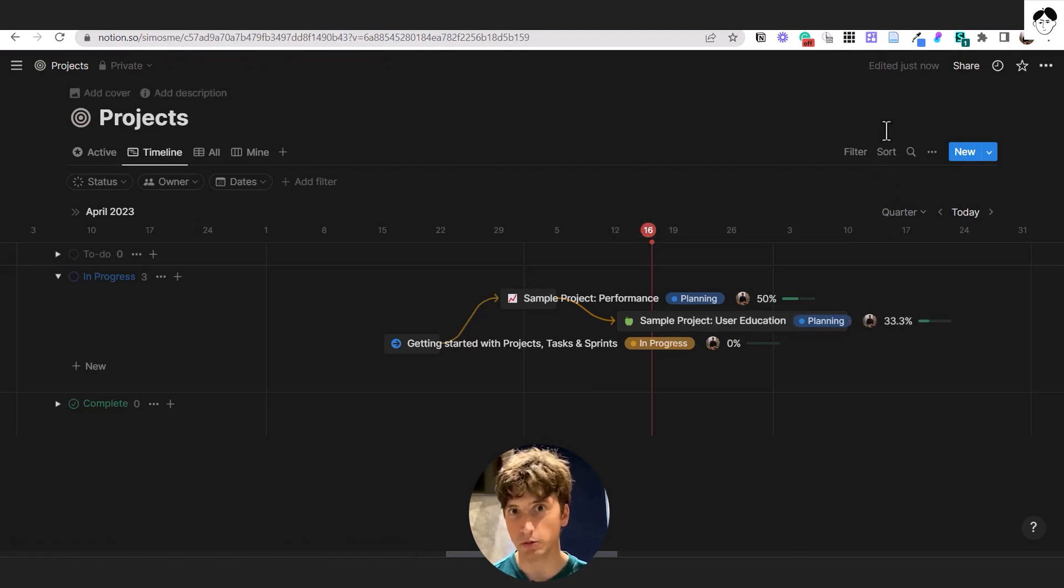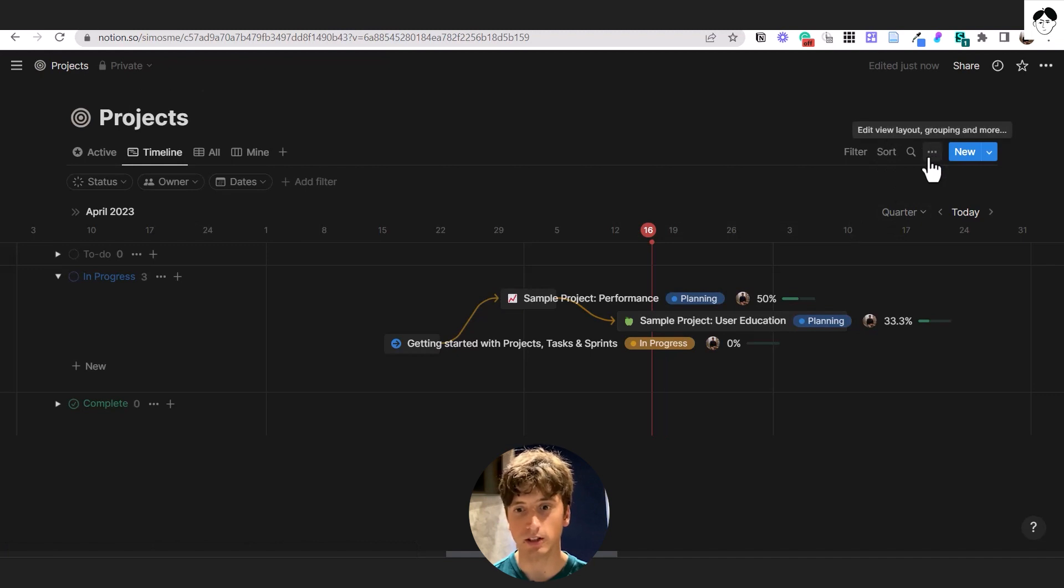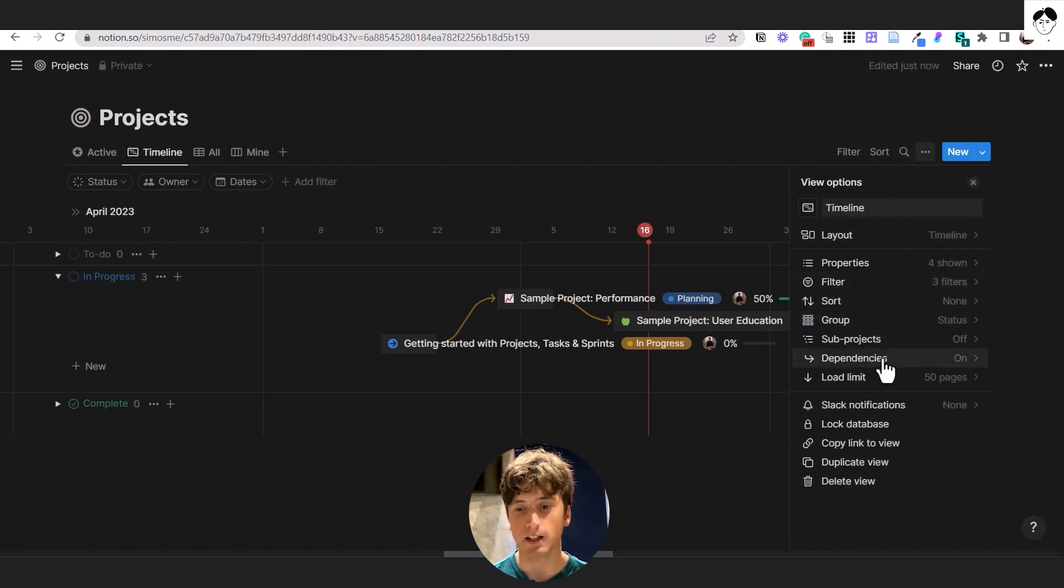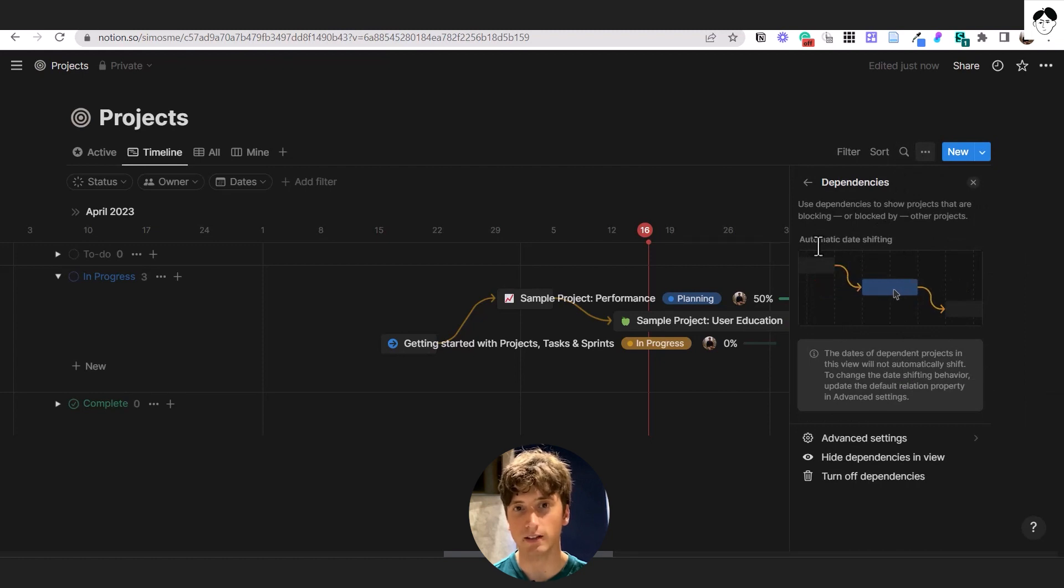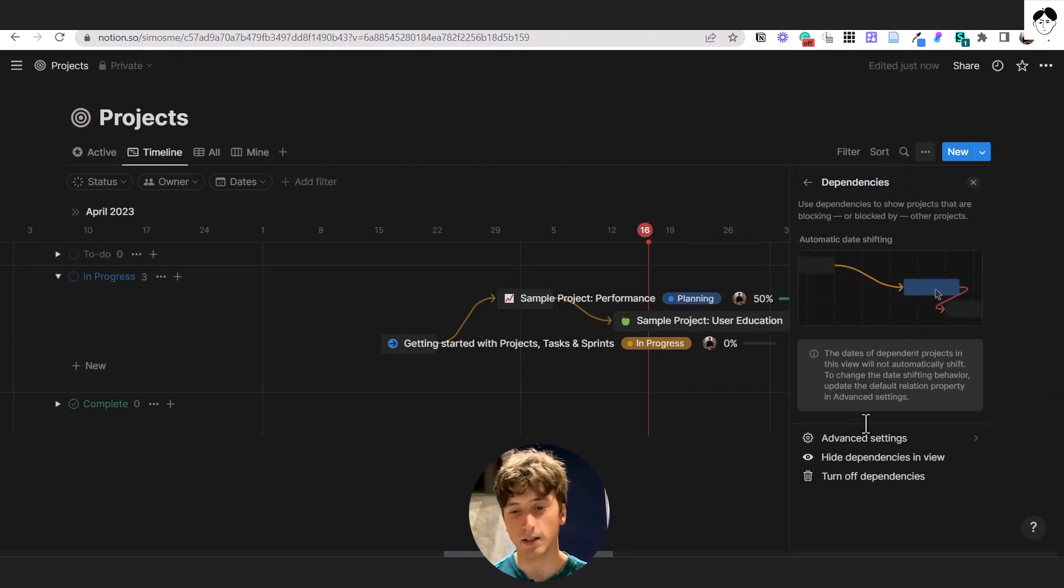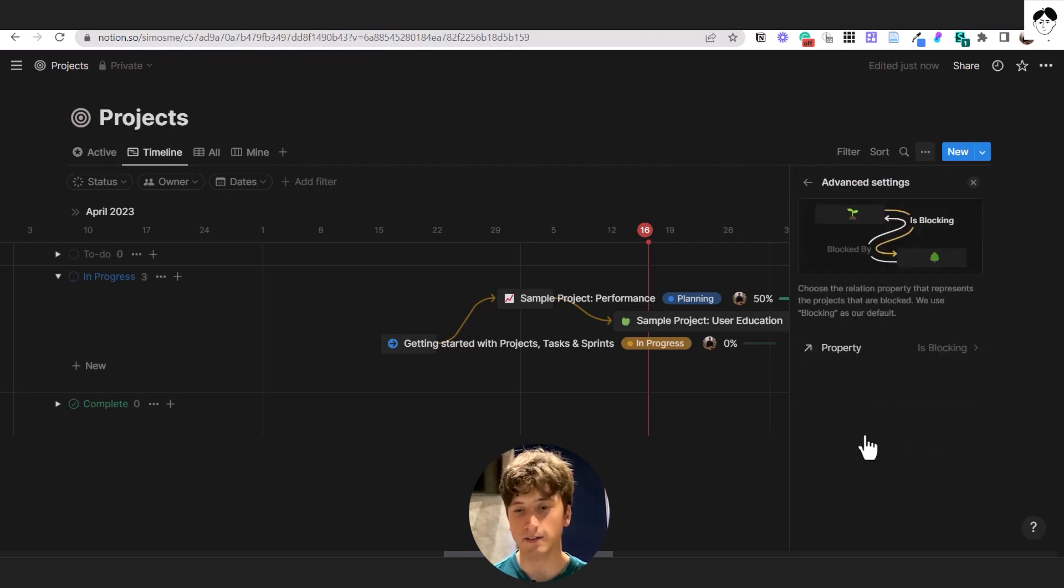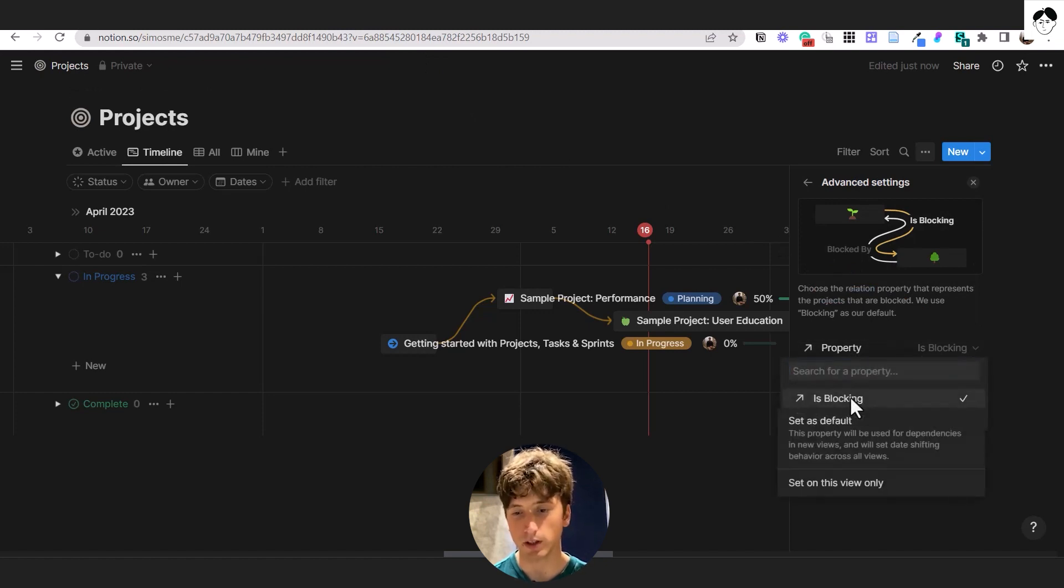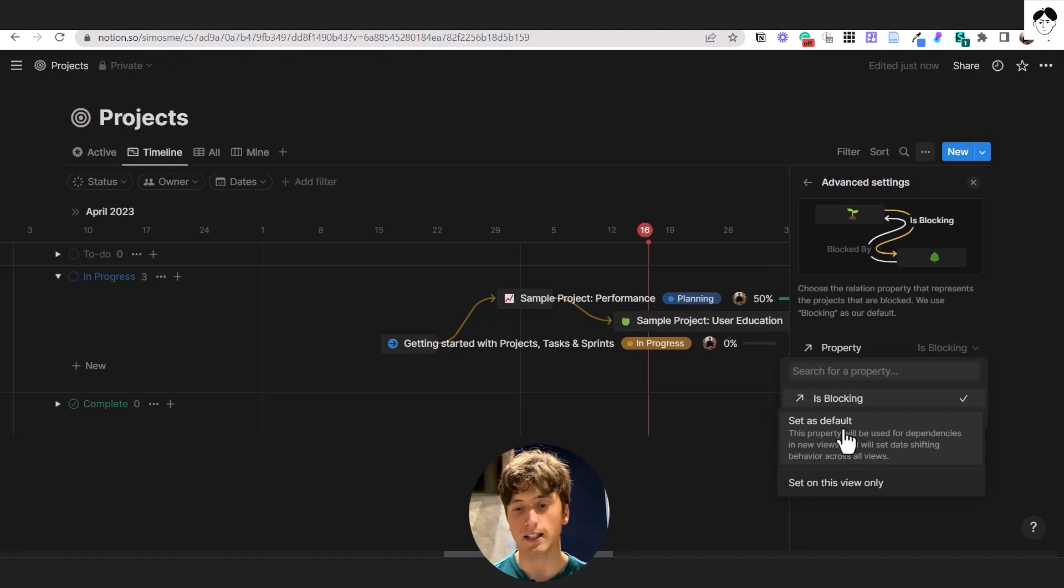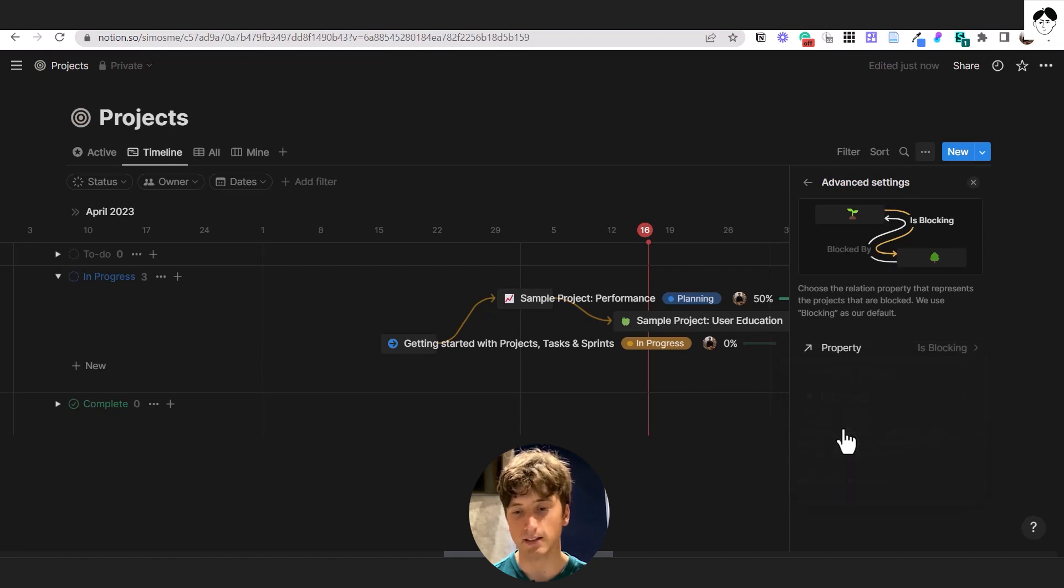Right now, there is a new feature regarding dependencies that is under dependencies. And you can see here it is called automatic date shifting. So here on this tab, we can go to advanced settings and the property will be is blocking. So we need to select that. And then we need to select set as default.